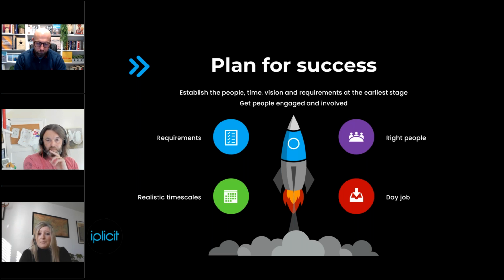And then making sure we've got the right people in that meeting. There are various stakeholders throughout the business that we believe should be part of that implementation journey, not only to manage the project and to have input in the project, but also to manage that internal change. Engaging staff as early as you possibly can will have a huge benefit to the success of the implementation. But it also allows those people that do the day-to-day operations to have a voice and an input, and gives us valuable insight into their day-to-day processes, because we've all learned along the way that if you've got key people in a meeting but they don't do the day job, then when we come to do training, there are scenarios that come out of the woodwork that we hadn't thought about or hadn't been made aware of. And so at the very beginning, make sure you've got the right people in that meeting.